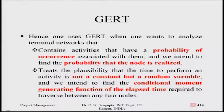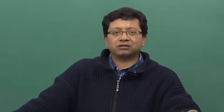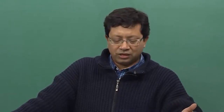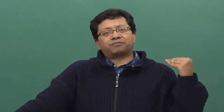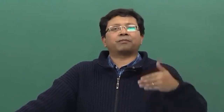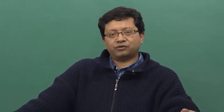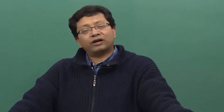One can use GERT when one wants to analyze terminal networks containing activities that have a probability of occurrence associated with them, and we intend to find the probability that the node is realized. Our analysis focuses on the precedence diagram considering the nodes as activities. We will find the probability of occurrence of a node, considering that the precedence relationships are met depending on the stated probability.